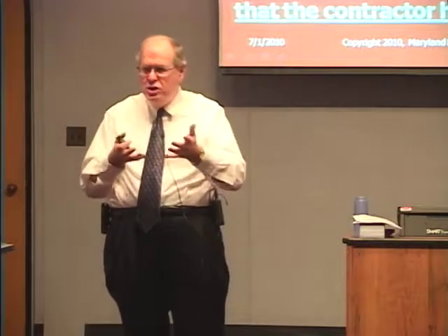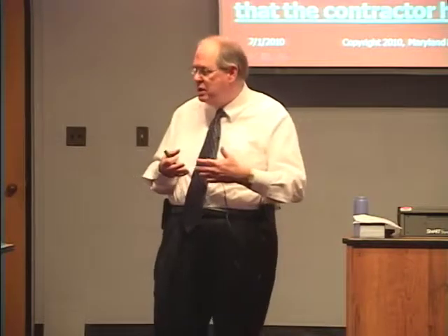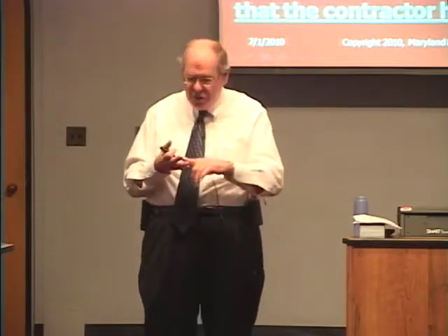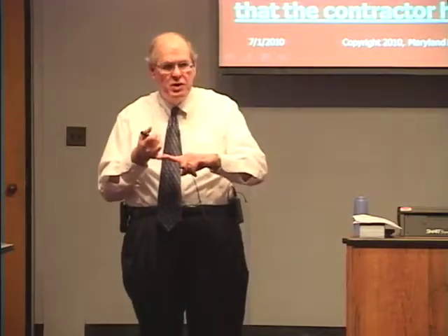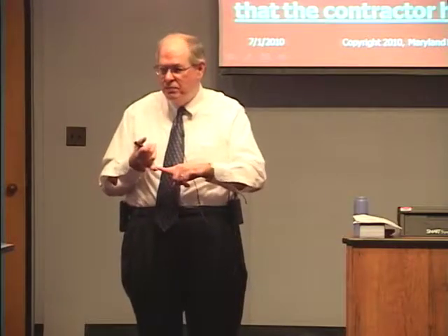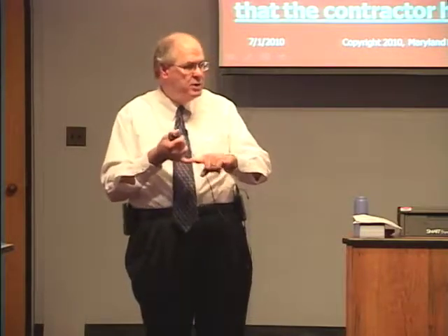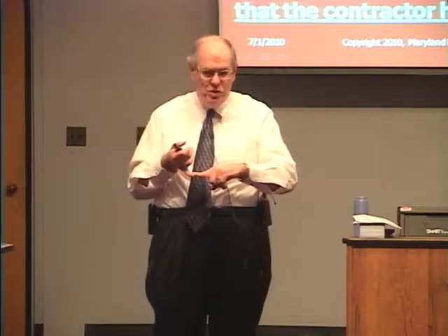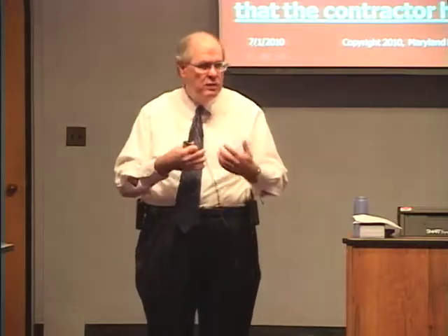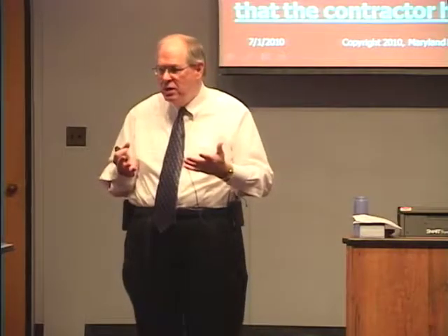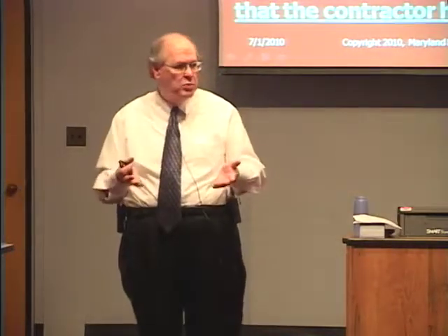And I said, okay, show me the documentation. In this case, they had a contract manager and they had, I think, monthly surveys of performance. There were a couple of years' worth of documented performance, and every single survey said the vendor was doing either a good or a fair job. There was nothing in the file that said the vendor was subpar, doing anything other than what they were supposed to do. Basically what I'm left with is, how do I tell the vendor that he's not entitled to more money if there's nothing here that says there's any problem with the contractor's performance?